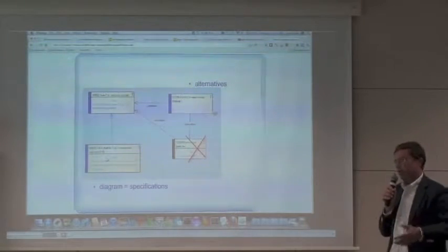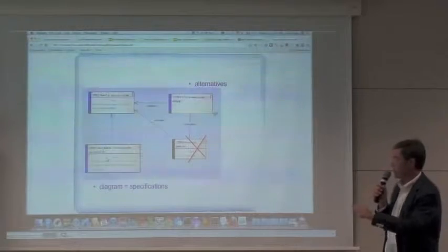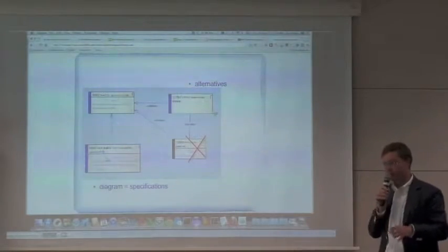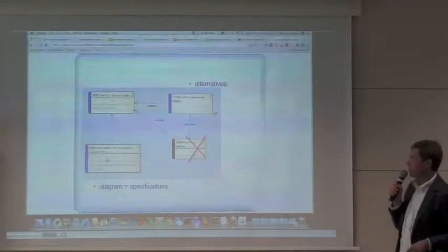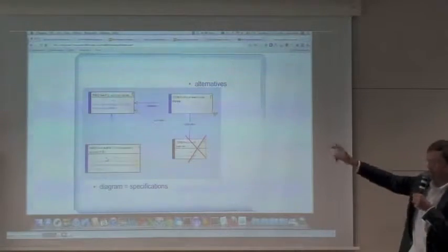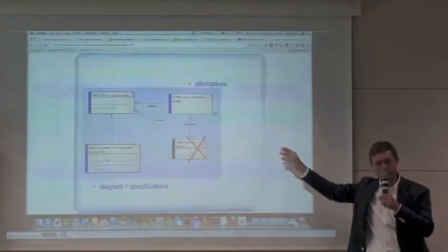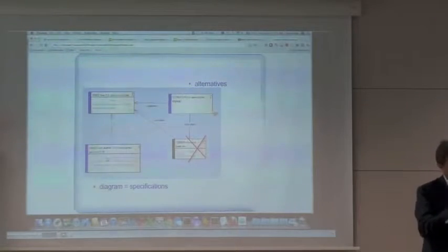While we are doing the feasibility analysis and so on, we can find different solutions for the same problem, and we track it in this way. We can have two different work items that are alternatives. One is rejected and one is approved.